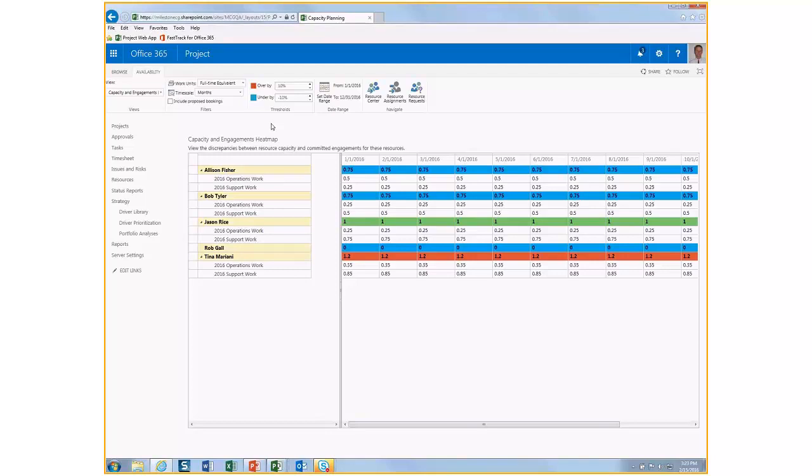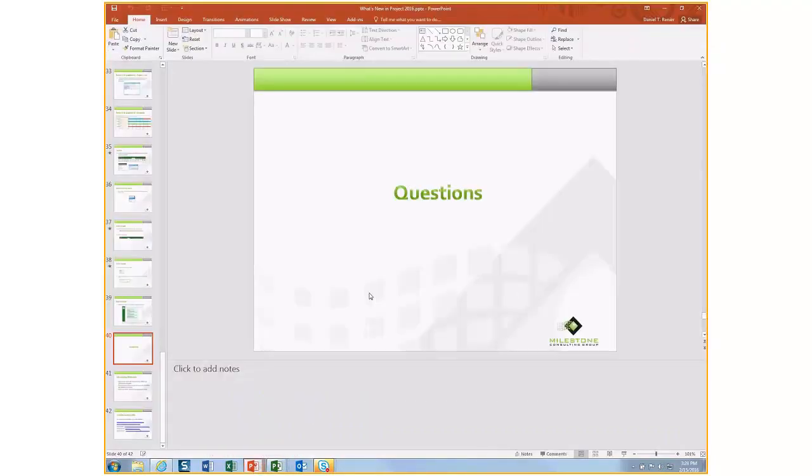The way that the resource planning portions of the Portfolio Analyzer got resource data was from essentially a footprint for a project that was specified in a resource plan. Because engagements are going to phase out resource plans, the new Portfolio Analyzer functionality uses resource engagements for that footprint of resource information instead of resource plans. So that's a simple answer to that question.